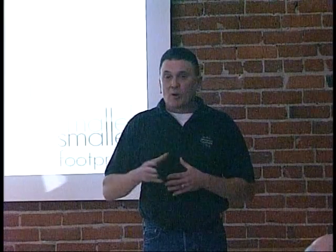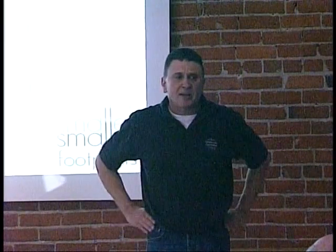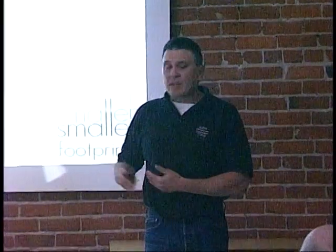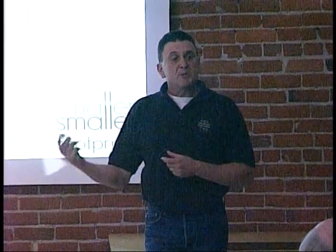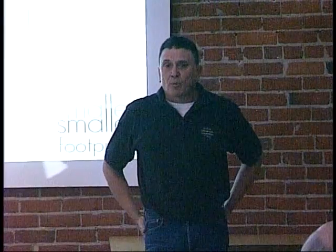If you come up and say, well, this sensor is not right and it was installed 3 months ago, it's hard to get that guy to come back. And so that's why it's got to be a process, like you're saying. It can't be at the end. And unfortunately, a lot of our stuff came at the end, where we had the commissioning reports, and everything was done off the commissioning reports. And so that whole process didn't work.